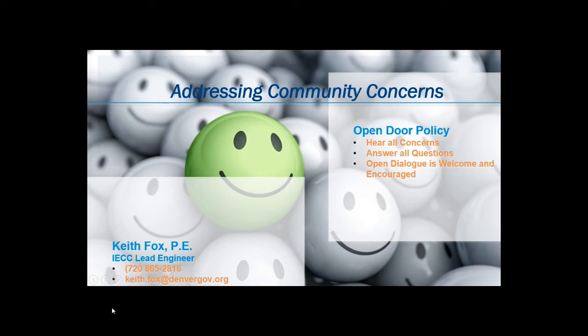I think you just answered this, but maybe clarify one more time. Is the Comm Check required in addition to the checklist? Yes, it is. One of the items, like I just mentioned, on the checklist does ask for the Comm Check to be submitted. And we are asking that you utilize the new Denver specific Comm Check. And again, if you go to the codes, you can select the Denver specific codes for the Comm Check. And that should include all of our new amendments.